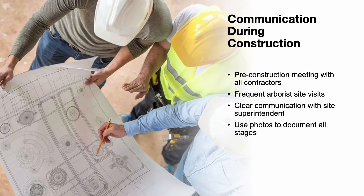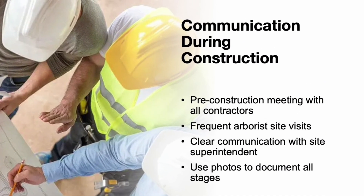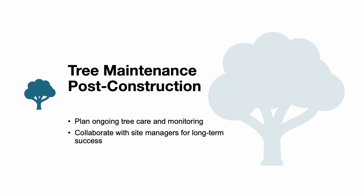Effective communication is essential. A single uninformed subcontractor can undo months of planning. Arborists should hold a pre-construction meeting with everyone on site. Regular site visits by the arborist are also crucial. The arborist should maintain direct contact with the superintendent and monitor all activity around the tree protection zone. Photos taken throughout the project can be valuable documentation in the event of a dispute. Once construction is complete, a post-construction care plan must be implemented, including regular monitoring and ongoing communication with the project manager to ensure trees receive the care they need during recovery.